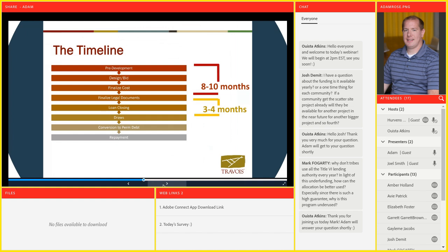So again, I just want to reiterate that the planning process for any particular project might take a full year. You might spend a year preparing a tax credit application. On a tax credit project, it's after you get a tax credit award that you start due diligence as far as construction documents and getting the financing in place to get to closing. So that's probably the time where, as the project turns from the pre-development phase into a bigger concept and the numbers get finalized, that's the ideal time to reach out to you at Native American Bank, right, Joel, and say, hey, we're anticipating this gap. We're going to submit a tax credit application in the summer, but we won't know about it until December. We're looking at closing maybe first quarter of next year.